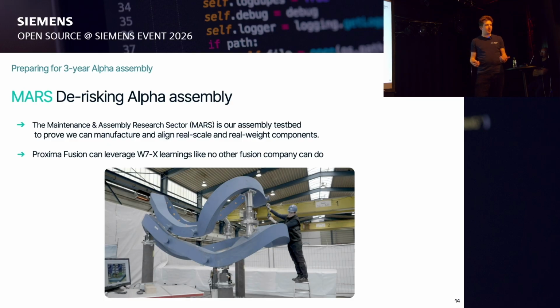And the key challenge with that was that as the components kept coming in, because there was no fully thought through CAD model plus assembly process that was validated with experiments and so on, they needed to figure out a lot of this: how to put this thing together, how to align it, how to achieve the accuracies, the tolerances, like even just threading the coils over the plasma vessel with 6 tons of coil on the crane and 5 millimeter clearance, more or less semi-manually. This was a formidable challenge, and I have the biggest respect for the team who pulled this off at all.